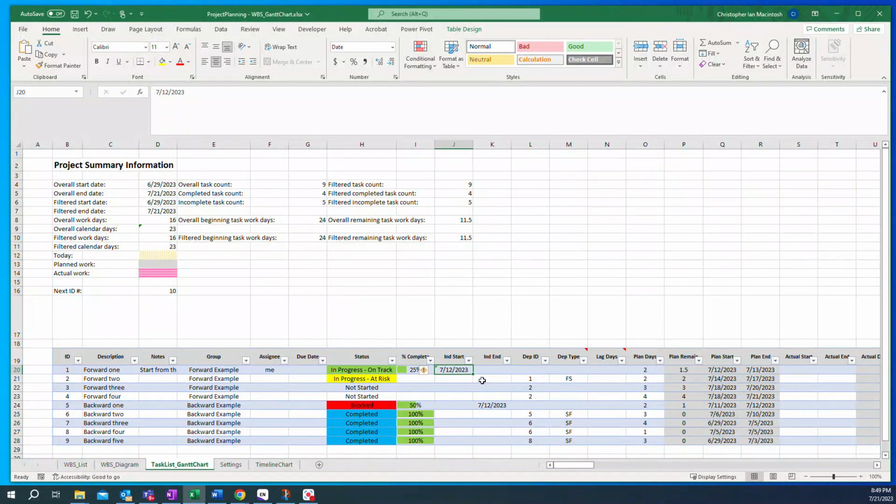But what if I didn't want to start this until today's date, which is July 21st? If I was doing this on paper, I'd have to manually recalculate things, but in here I can just change the date, 2023, and now I see that today's a Friday, and so you'll see that if I started today on the 21st with 2 days, it wouldn't end until the 25th.